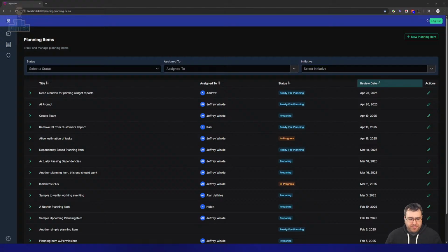But they should be reviewed. They should be evaluated, prioritized, all the time. If you have an issue reported, what that comes down to is good triage. In an open source project, that's obviously not very easy. Good triage, being able to say, yes, this is an actual issue, or this is not something we want to do, should be done quickly so you clear it out and purge it. Sometimes something's not in the interest of the software. Sometimes there's an actual problem that needs to be addressed, but it's hard to recreate. Those you should triage effectively and quickly.